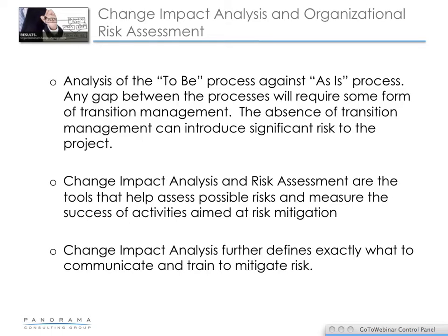There are many different aspects of the change impact analysis. We look at people's jobs, their roles, their skill sets. A lot of times we're dealing with a number of different locations. We identify the different locations, and sometimes each location is impacted differently. And through the change impact analysis, we put together an action plan that then becomes a part of the overall OCM plan. The change impact analysis and risk assessment are tools that help assess possible risk and measure the success of activities aimed at risk mitigation.